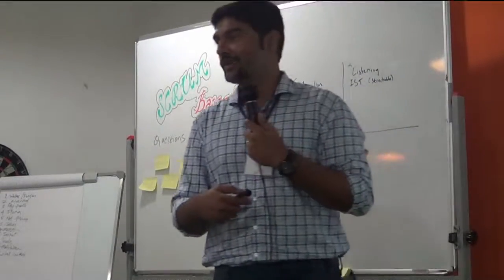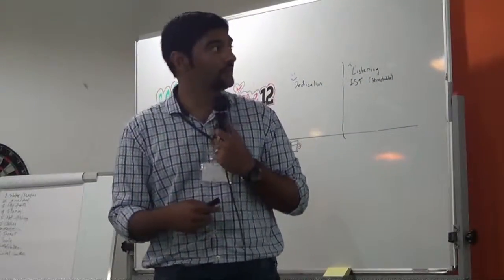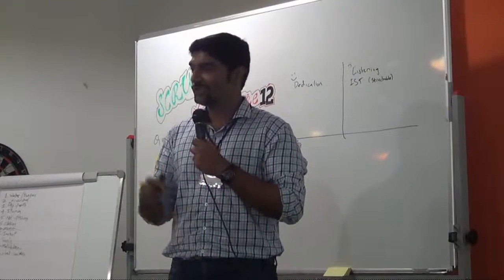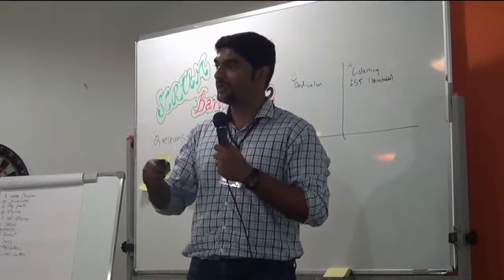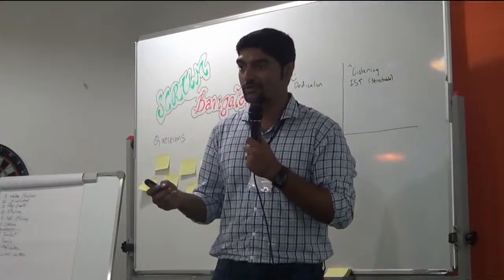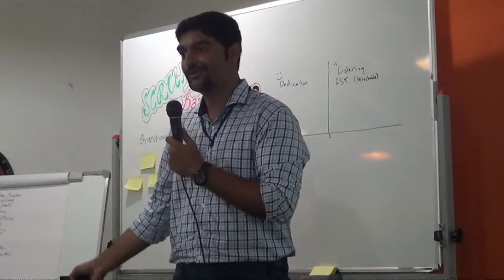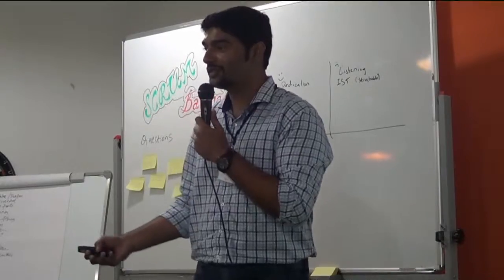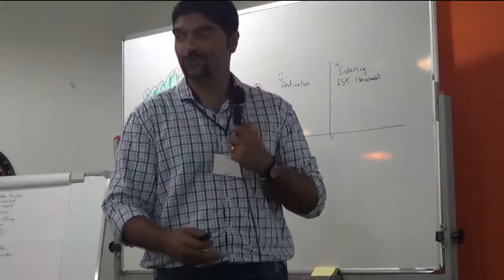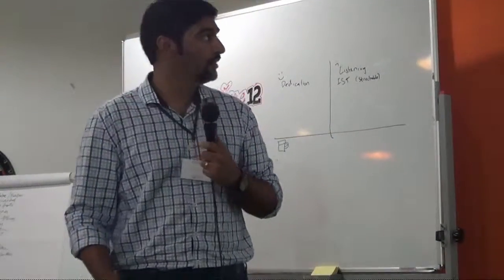And this is the primary reason that we found that release plans fail: no reviews. So in Scrum, we make a release plan and then we act waterfallish about it. Right? We say, okay, we made one 6 months ago, it has to hold 6 months later. Doesn't work that way. Right? Considering it's agile, you should be reviewing it every time.